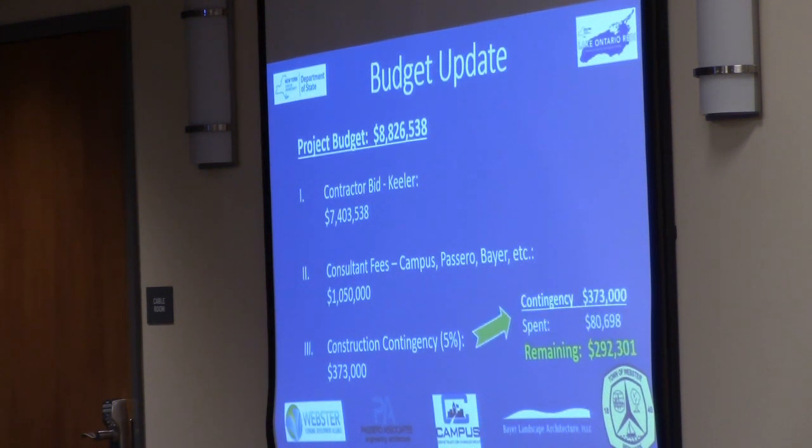The initial budget was $373,000, of which we have spent on change orders $80,000, leaving a remaining $292,000. We're in a really great spot budget-wise.